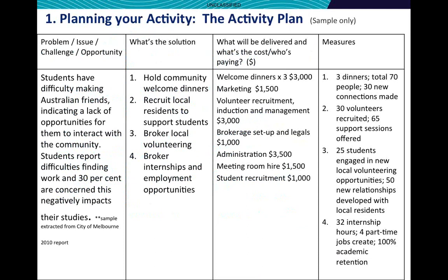Two really critical points we want to make here relating to the program specifically is that we set the measures of success for our activities. So we really need to make sure that they're achievable. Please don't overstate what we think you're able to do. Really consider how long you will have to deliver the solution. By the time you factor in receiving the funding, getting ready to deliver, and then the reporting time, you may have between 8 to 10 months depending on the activity. So please check that your measures are actually achievable within that time frame.